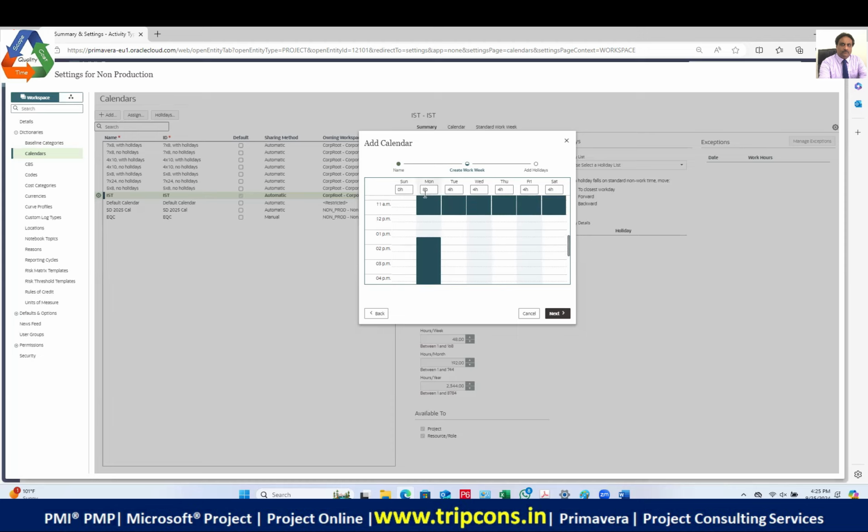So it makes 8 man hours. Do you see on the top? It is completing 8 man hours as mandated by the law. The starting time is 8, and you are getting a break of 1.5 hours, from 12 to 1:30, and then your work starts at 1:30 and goes till 5:30, right? So you have 4 hours plus 4 hours as the total man hours. Now you do the same thing on the Tuesday. Rita, you go ahead and do it. Okay, so you click here on the Tuesday, you click at the 1:30. Let me point it. Click here.